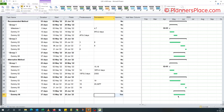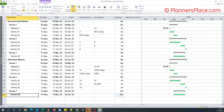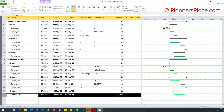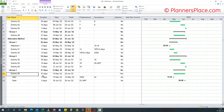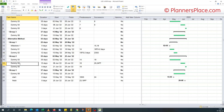You see, it now appears as a normal task rather than a summary task. For the fact that it's bold, you could just select the row and un-bold it and it's done. So when you print this as a PDF, it appears well. When someone looks at the schedule, they know it's got subtasks, and when they click the subtasks, they'll see the tasks driving the dates of dummy eight — this task and this one.